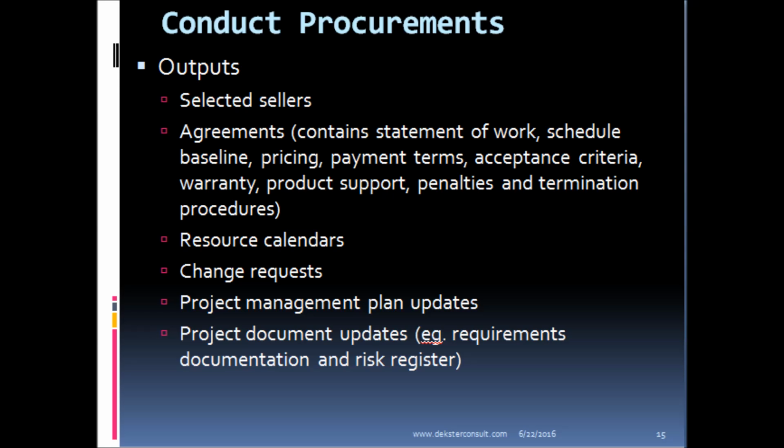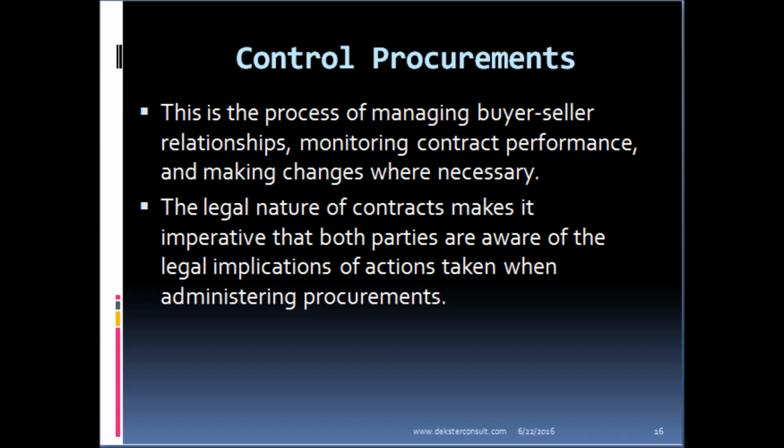Because we've done procurements, there could be change requests to our projects, and then our project management plan will need to be updated, and other project documents, maybe the requirements documentation and risk register, could all be updated as a result of the new changes on our project.